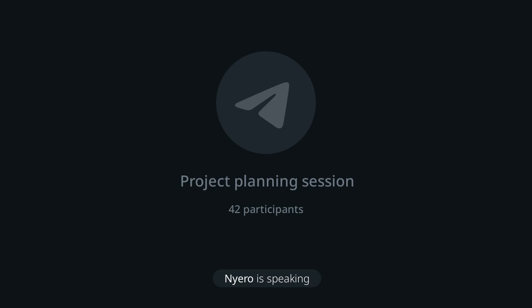Everything in the other categories is not going to be launched within this 3 months window. The features in your should have category can be next on your backlog, and the features in your could have category can be later on your backlog.